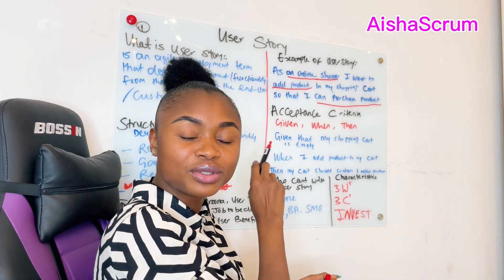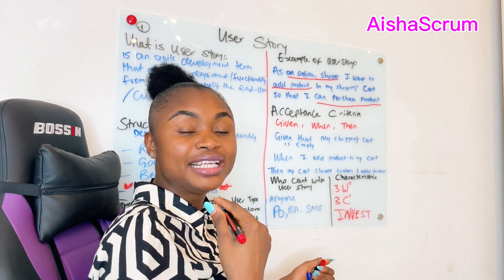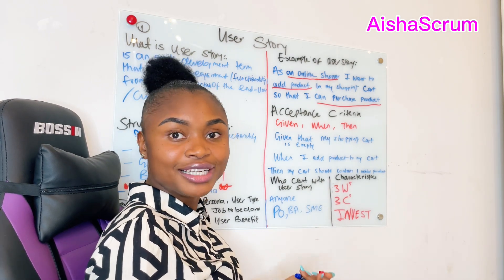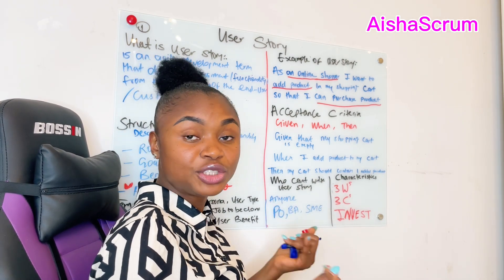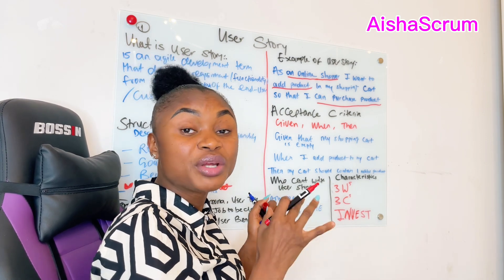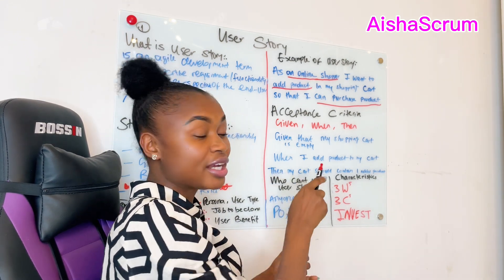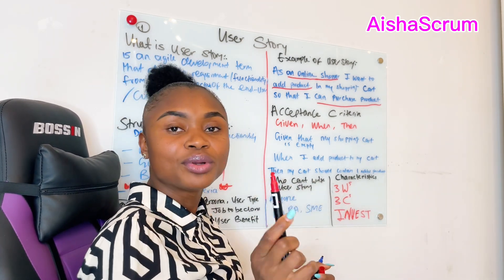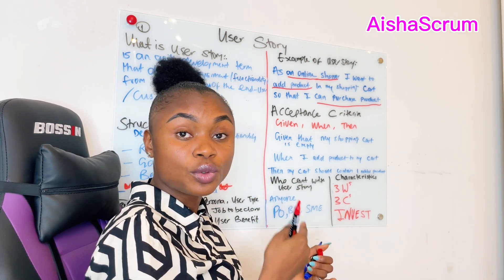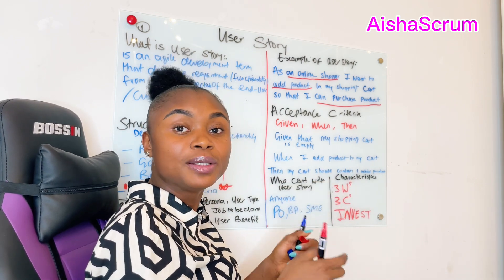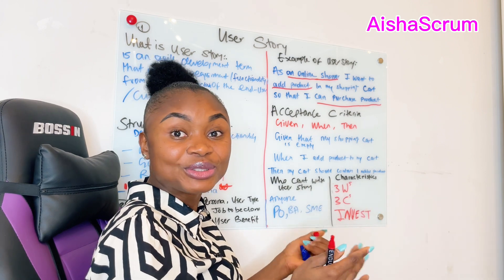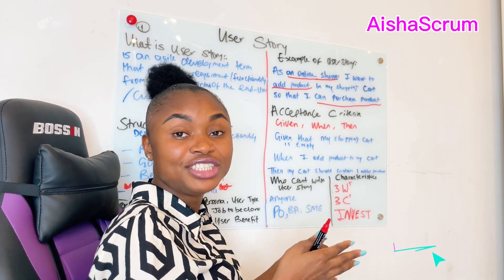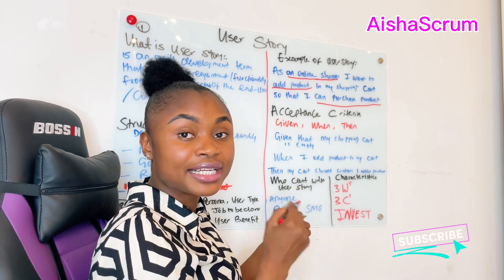We are telling engineers what the end user wants — the what and why — and also what the end product should look like. If we can accomplish all of that based on the given criteria, then we have our increments. For the online shopper example: 'Given that my shopping cart is empty' — when they start shopping, there should be nothing in the cart, and the engineer creates that functionality. 'When I add a product to my cart' — the engineer builds that add-product action. 'Then my cart should contain one added product' — not multiple products, just that one. If the customer can do this on their online shopping site, the job is done. The engineer successfully completed the work. That's why acceptance criteria is very, very important.